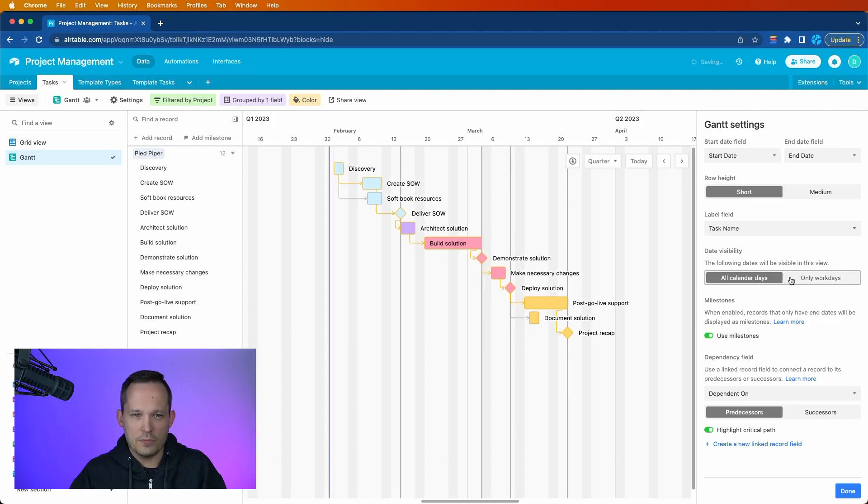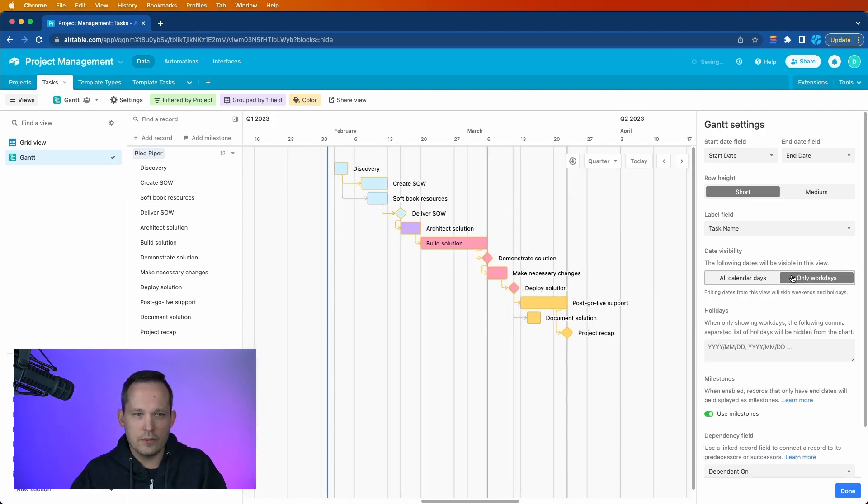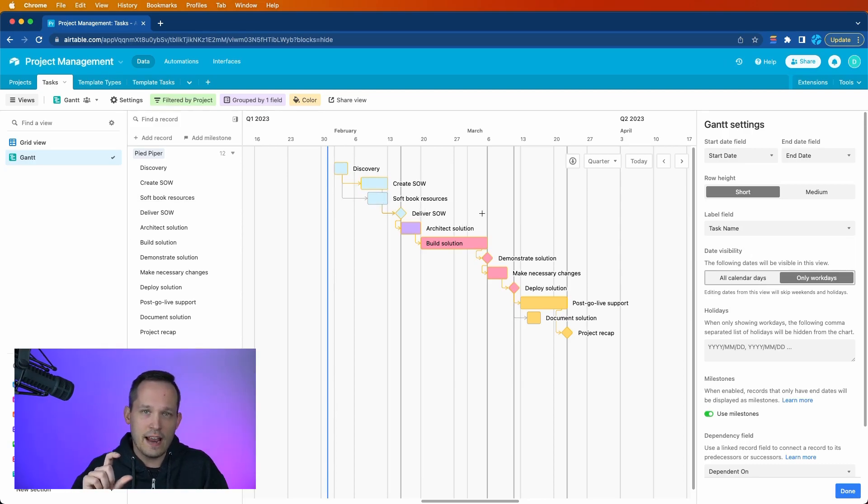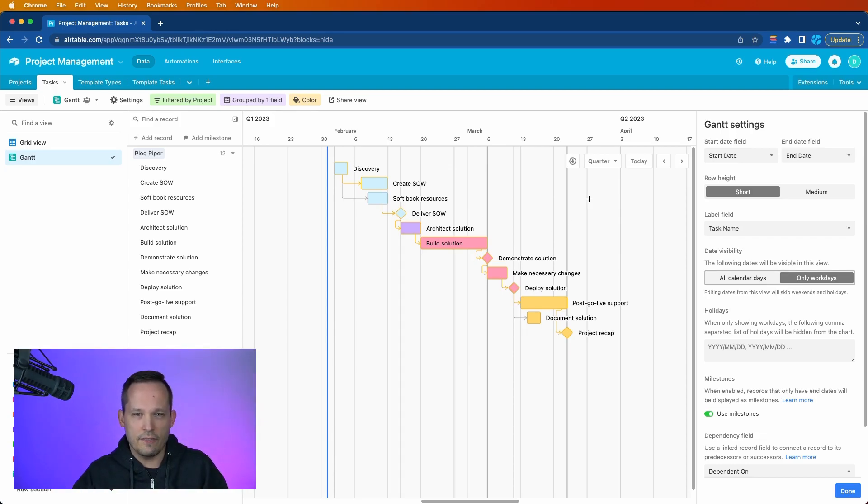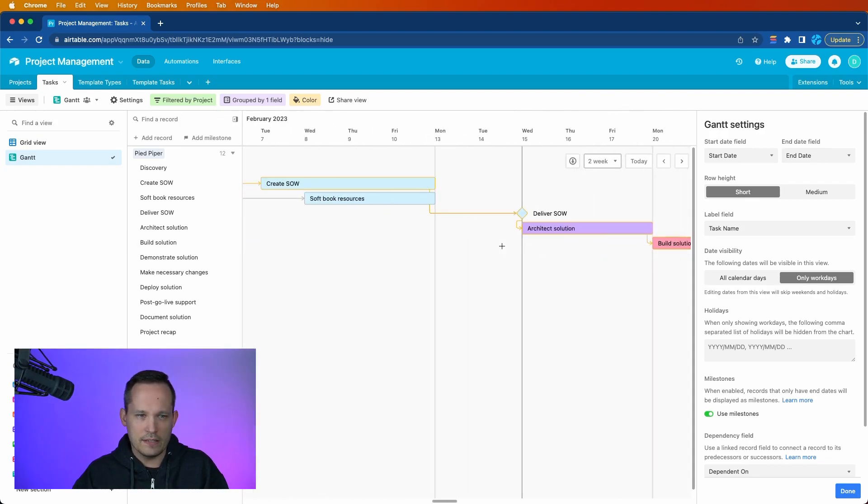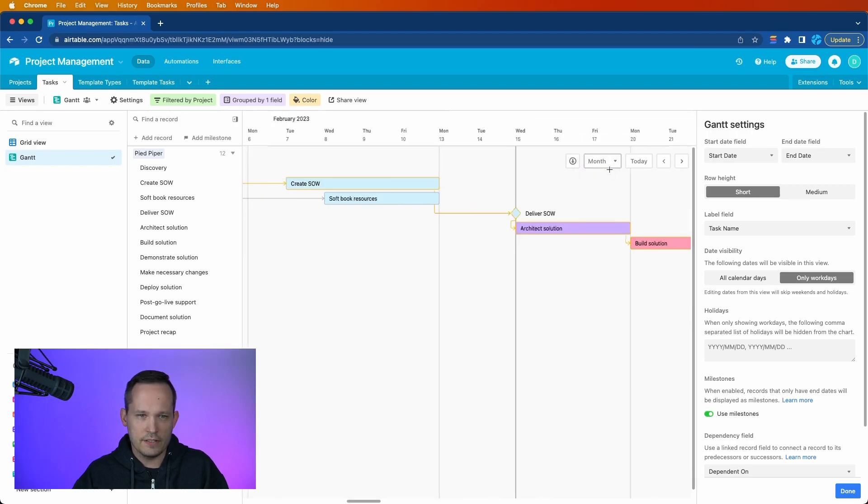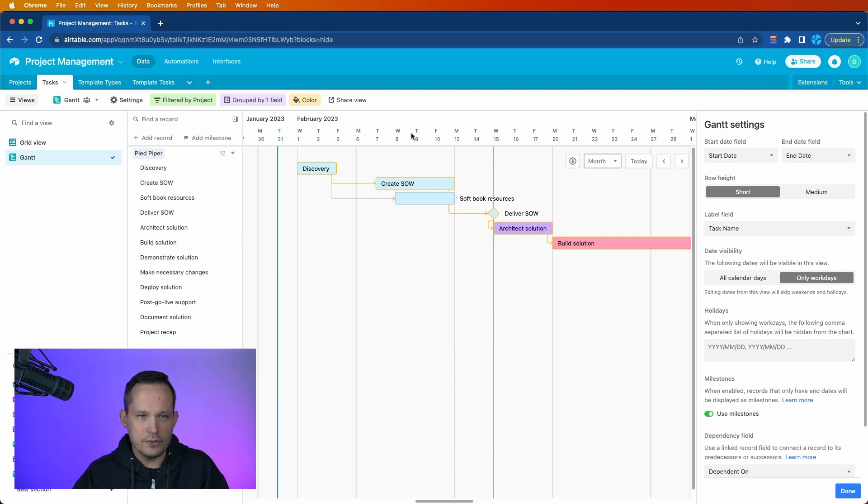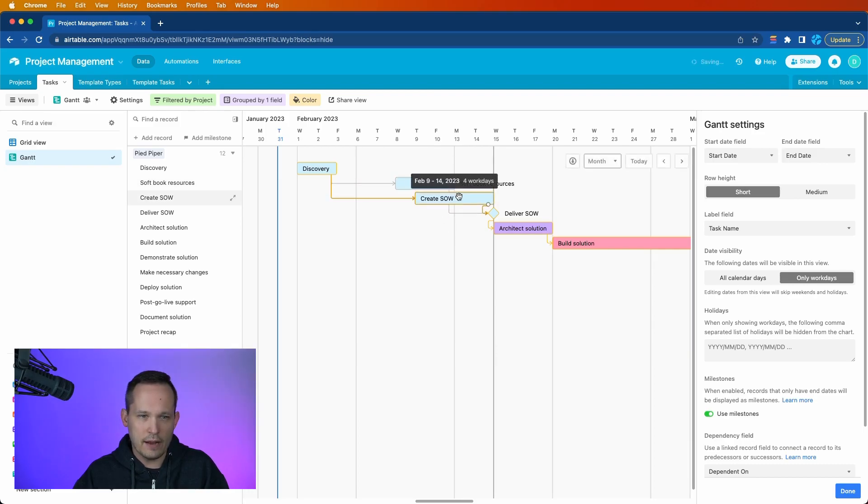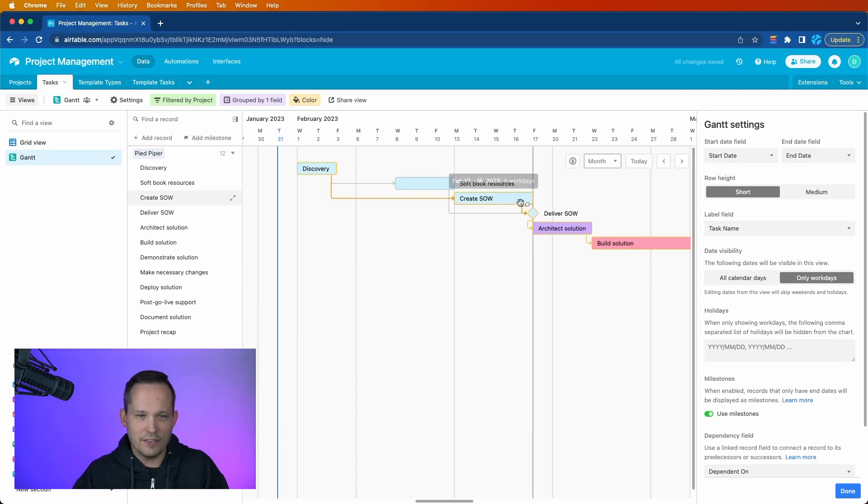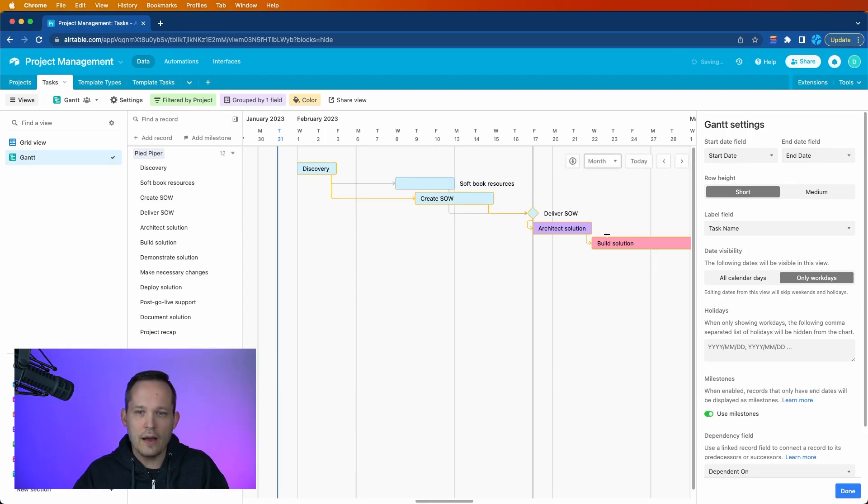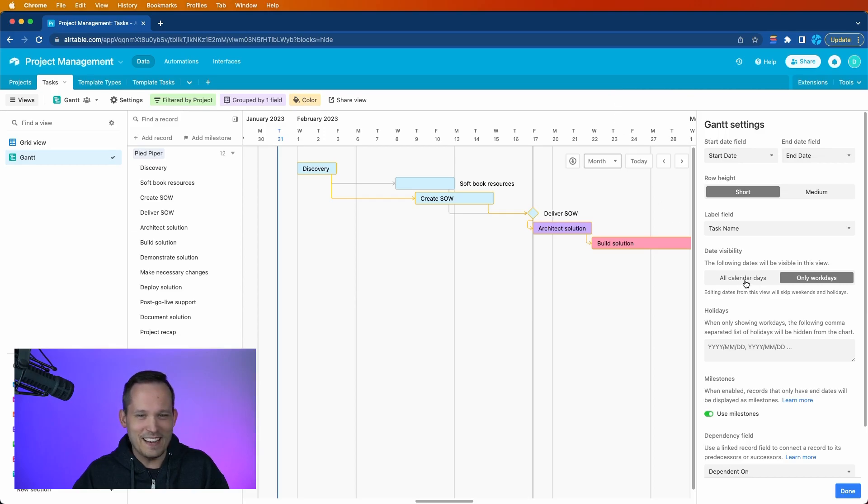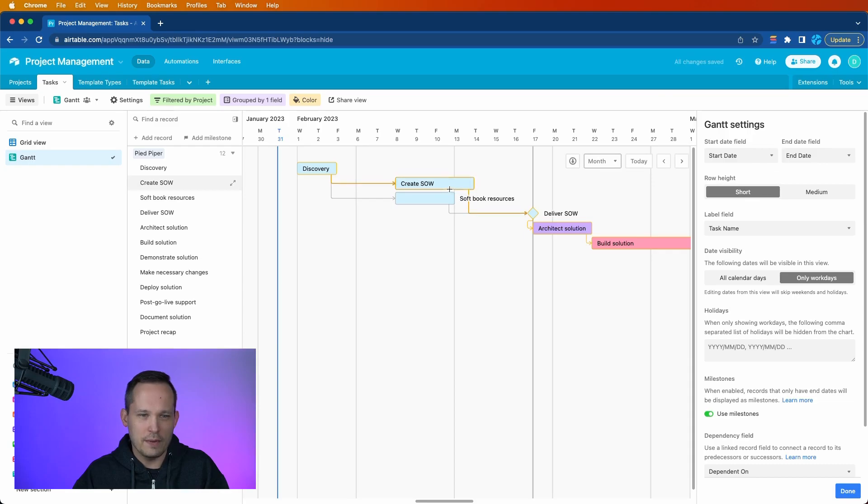And it's a subtle change. But you'll notice that that's going to filter out the visible weekend dates. And what's really nice is when you're actually dragging these days around, it's not going to have something fall onto a weekend. So if a task was supposed to take four days, let me zoom in a little bit so we can see this. Remember, you've got the ability to zoom in and look at this at different levels. Let's maybe do a month here. So if I do only work days, notice how we've got the Monday, Tuesday, Wednesday, Thursday, Friday, Friday, we don't see Saturday or Sunday. And if we're pushing something around and we're pushing out those dates, that delivering the SOW is never going to fall on a weekend. It's going to take that into account as long as you have this setting selected. So I definitely do that right away, especially if you're an organization that values your employees' times and not working on the weekend. Definitely don't schedule it over that time.